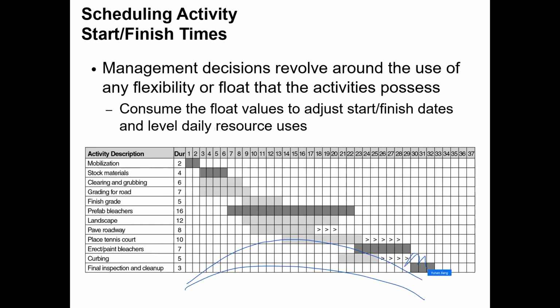If that is your M and this is your H, you also have a limitation. Remember, you only have 5 as the maximum. So in this case, those are more than 5. Can we schedule this work together on the same day? We cannot. We need to shift it over there. So that is resource leveling. I'm just going to give you some information here. We will learn this from lecture notes 6.